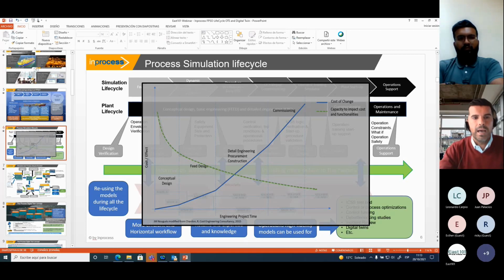I mean, building the topside model and having the interaction with the subsea behavior, right? For the HP separator and test separators. If we are talking about an FPSO, right? So maybe it takes 4 or 5 months to have a complete integrated model of a facility. But we adapt, of course, depending on customer needs.